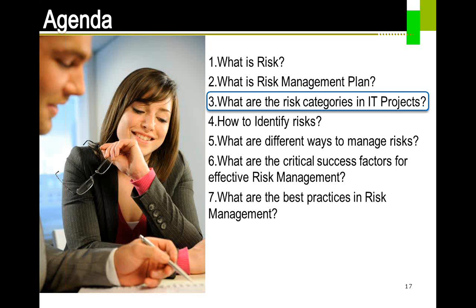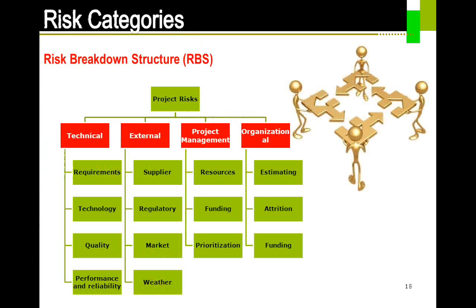These categories in IT projects. So this is this slide. You can see it's not applicable only for IT projects, but it can be applicable for any project. You can see at a very high level, you have the technical risks, the external risks, which are not part of the project. You can also see the risks associated with project management, and finally, organization risks.